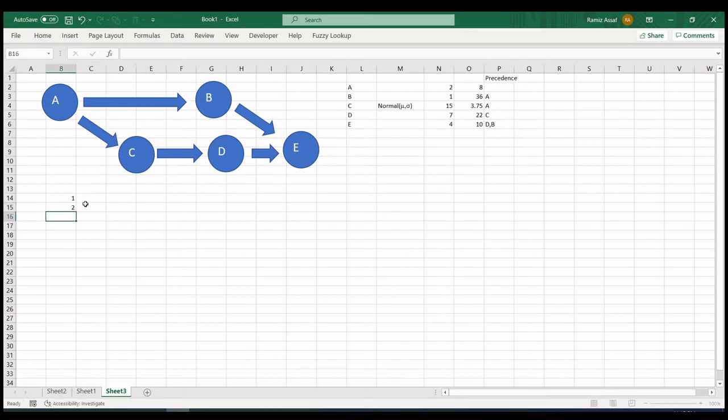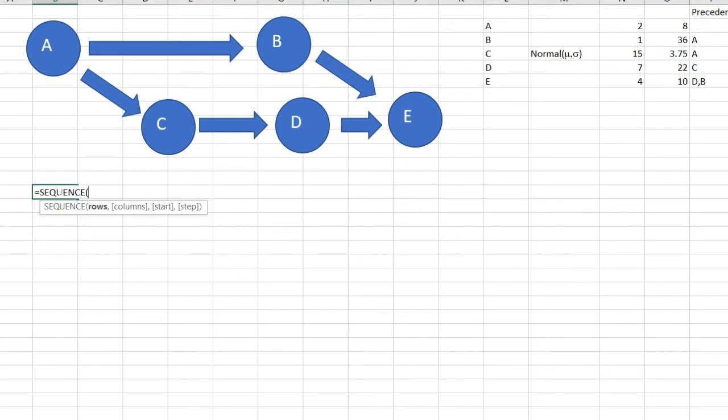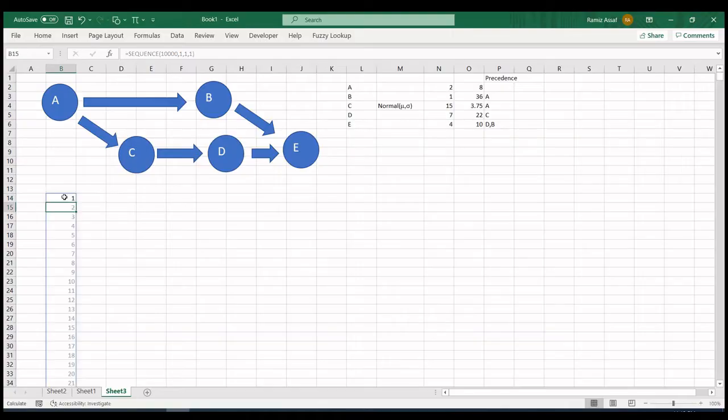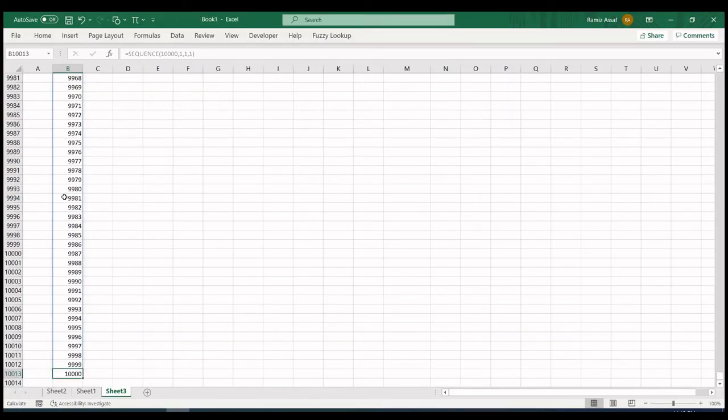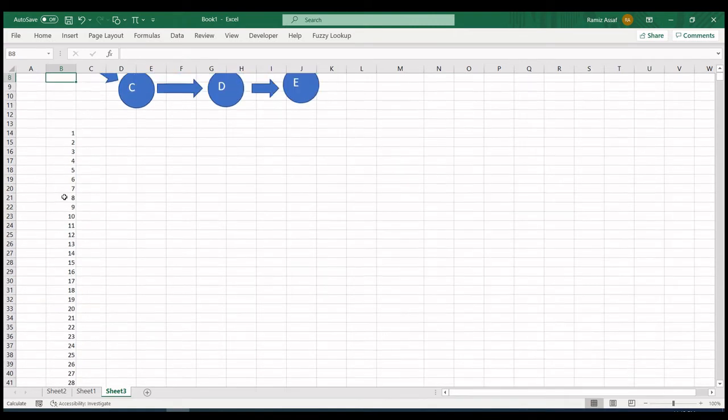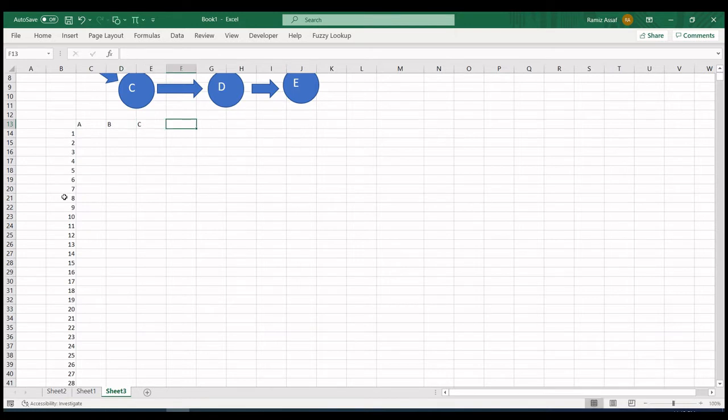Let me use a new formula in Excel if you have it, it's called SEQUENCE. I'm going to use 10,000 rows, one column, start 1, step 1. So this is 10,000 different projects I'm going to simulate. Now I'm going to simulate the time for activity A, B, C, D, E—the five activities for all of these.